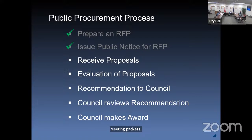Question? Yes. May I ask, how many firms out there manufacture this type of equipment? And when you say a long lead time, how long is a long lead? Yes. So I'll talk about how many as part of my presentation, if I could defer that question. Sure. And we're going to also talk about lead time, but in general terms, some of the equipment for this treatment plant, let's say a generator, as a case in point, can take, oddly enough, upwards of a year to procure. I'm familiar with generators. Yeah. I agree with you. I'll talk about all of those ahead. Okay. Save your thought and I'll get there.